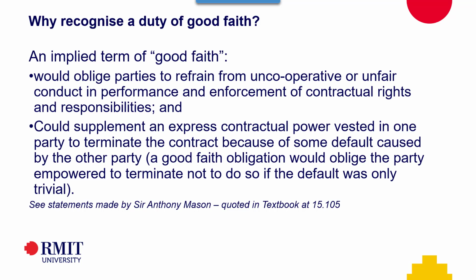So an implied term of good faith would oblige parties to refrain from being uncooperative or acting unfairly in both the performance and the enforcement of contractual rights and responsibilities. Think about how many contracts we've seen along the way where a party had a right to do something that was effectively a unilateral right, such as "such terms, the additional terms as my solicitor sees fit," or "if X happens, then we can terminate the contract."